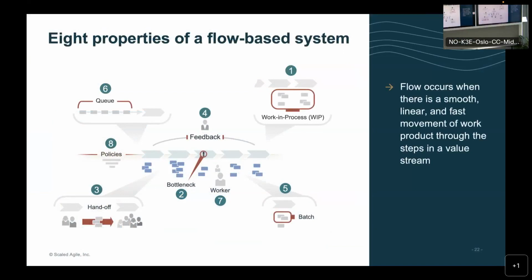6.0 is focusing very much on the flow side of getting value through, and they have put together these eight properties, as they call it, to be able to handle and to enable flow. You have queues: are queues building, then you will have lag, and things will be put out late. You have batch sizes as one metric: how big a chunk of work do you plan for. A project is a really big batch. We need to have it much smaller to be able to actually make it flow through the system.